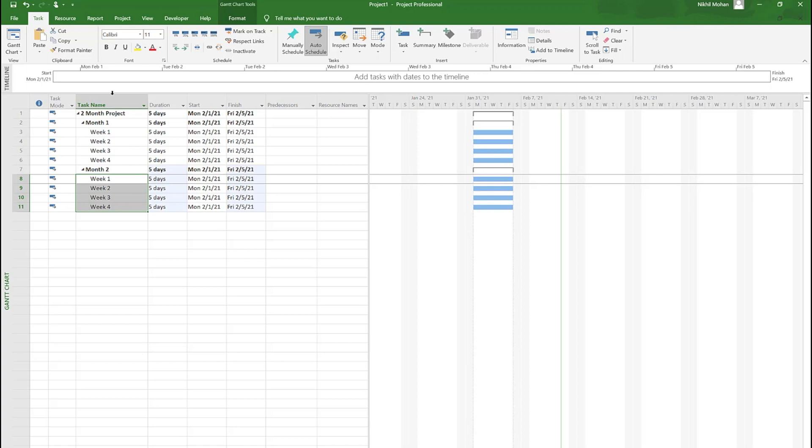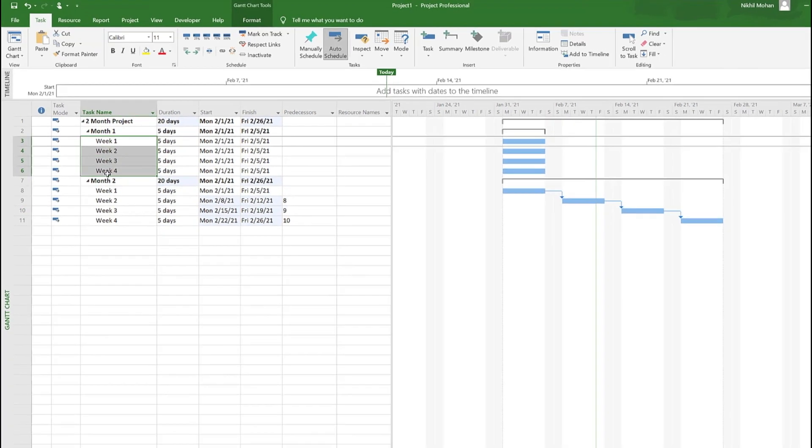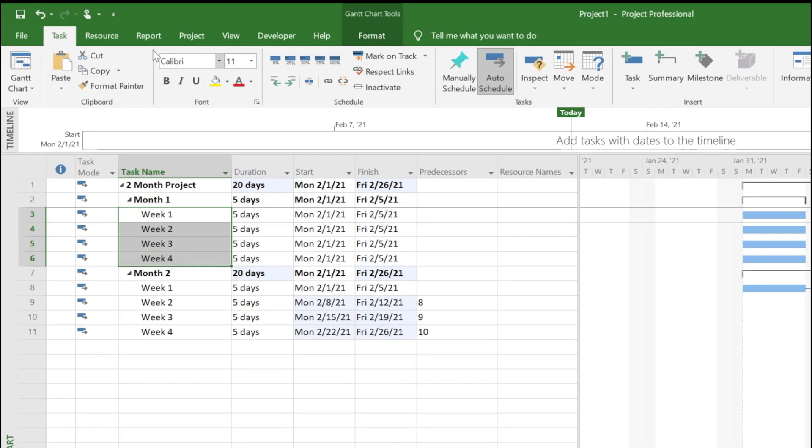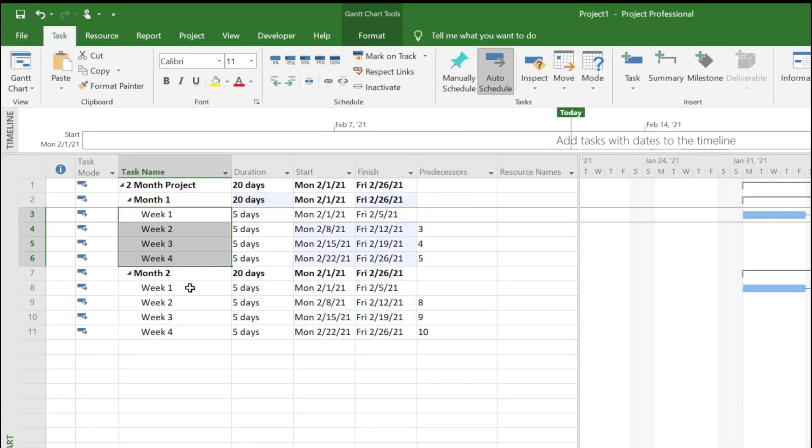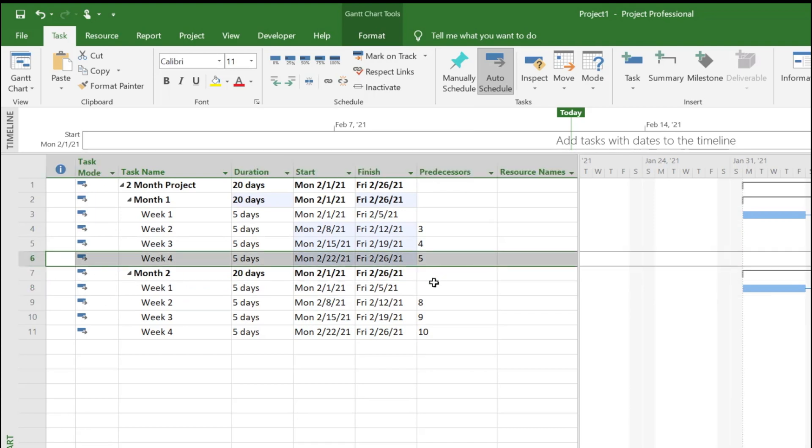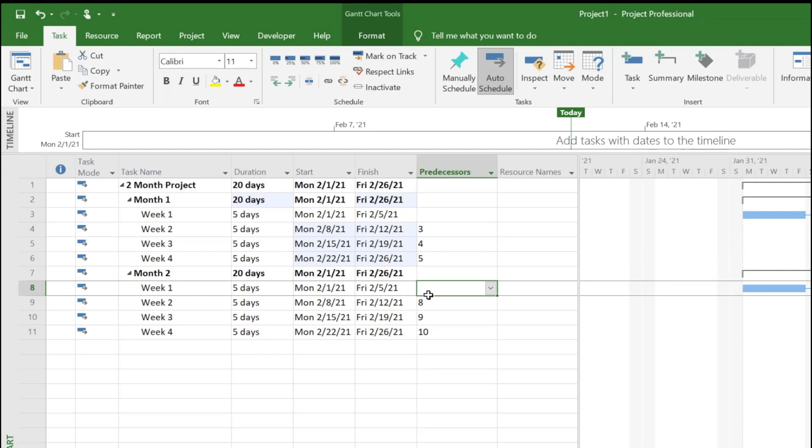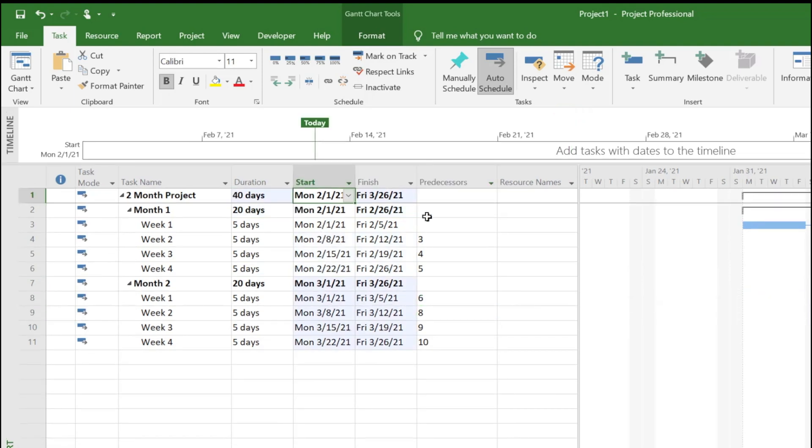You can do Ctrl F2 to link, or you can select and use the link button. For week one in month two, just put week four as the dependency, that is number six. Now we know that the project starts on Feb and goes all the way till end of March.